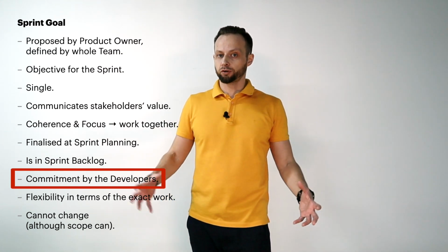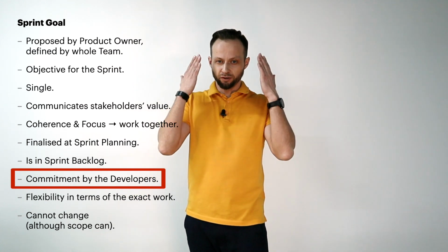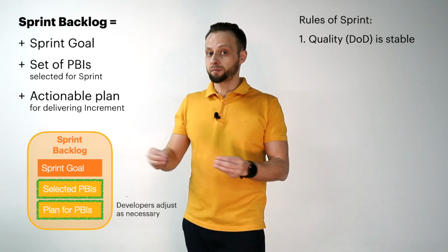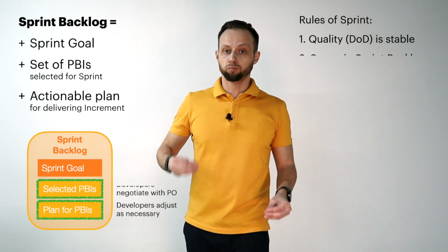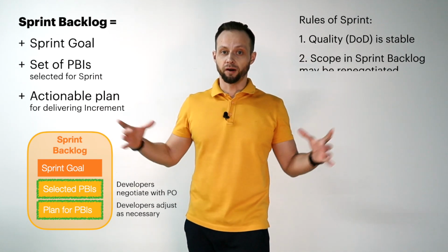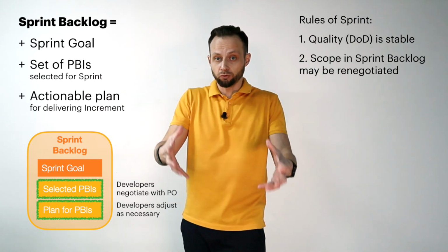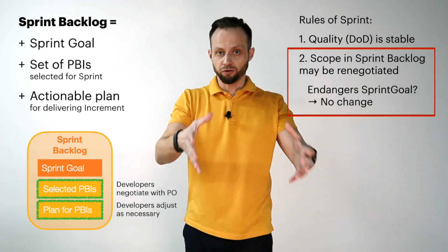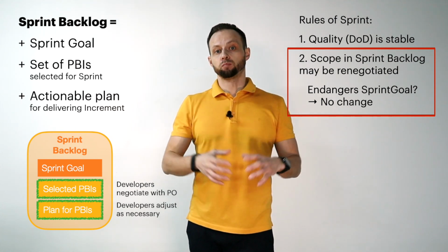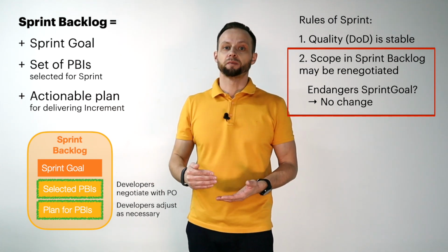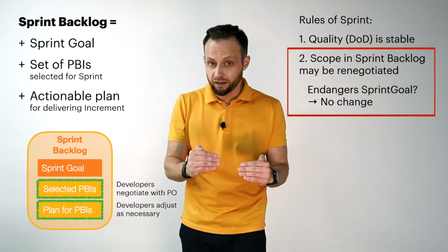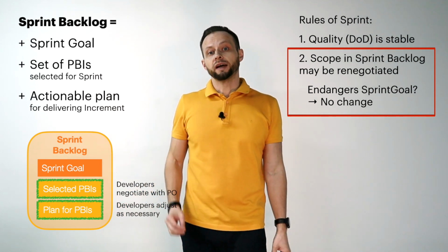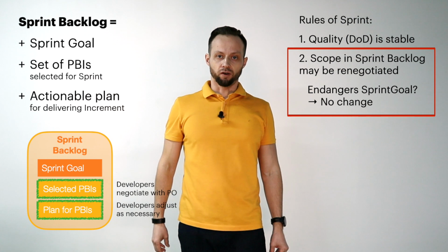As the developers work during the sprint, they keep the sprint goal in mind. If the work turns out to be different than they expected, they negotiate with the product owner the scope of the sprint backlog within the sprint, without affecting the sprint goal. No changes are made that would endanger the sprint goal. The progress toward the sprint goal must be inspected frequently and diligently to detect potentially undesirable variances or problems, at least once a day during the daily Scrum.